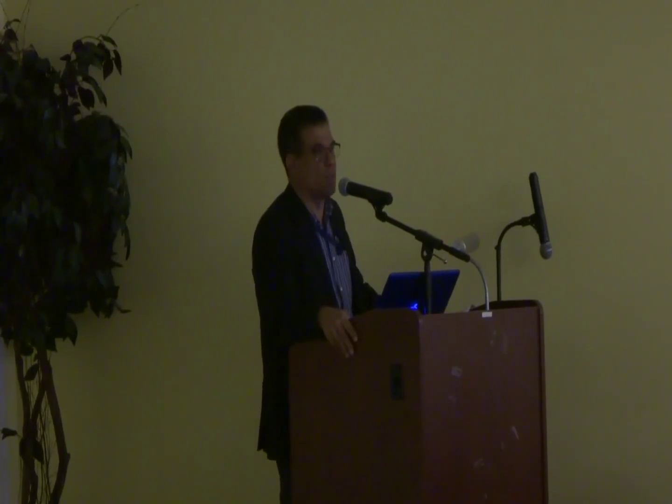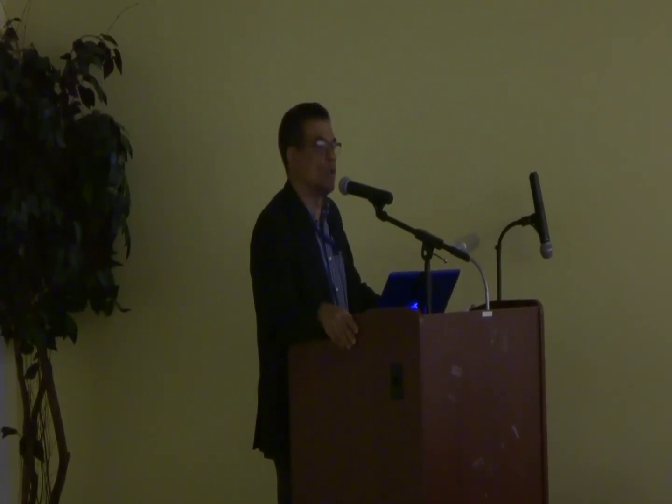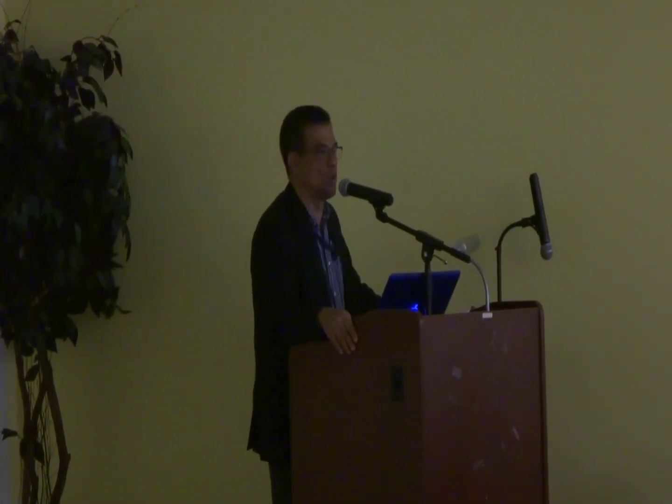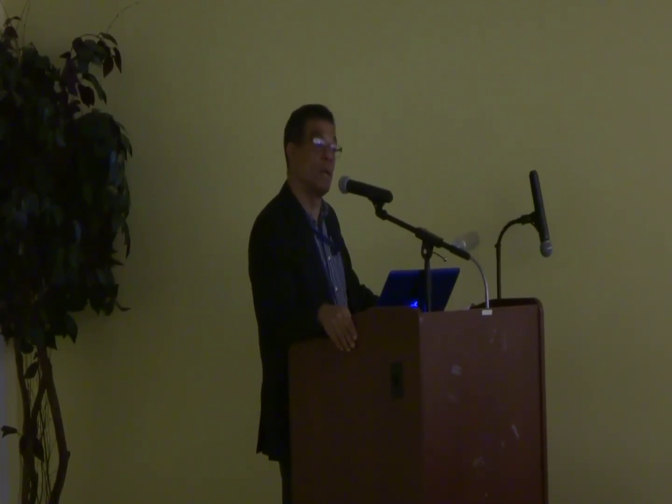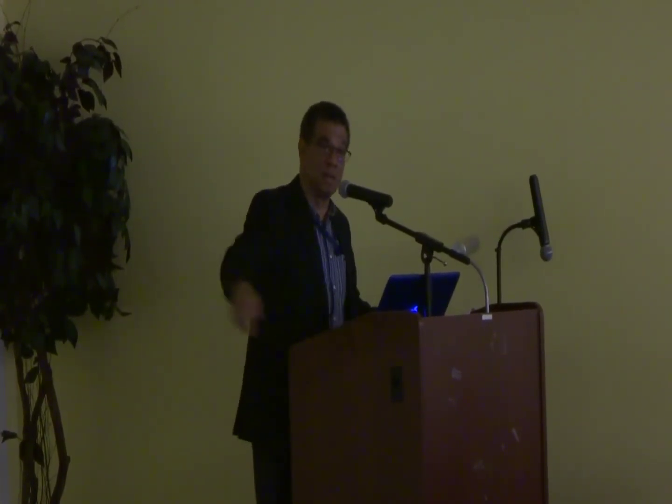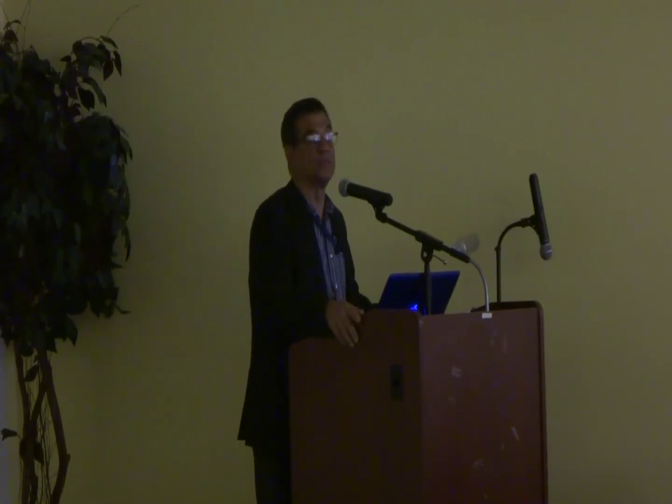If the tendering process is a private one or negotiated, then obviously you can change the tender. If it's a public tender where the contractors are all present, you cannot change that because you are opening yourself to a lawsuit from the other tenderers who will say you are giving him a tender at a higher price or a lower price.